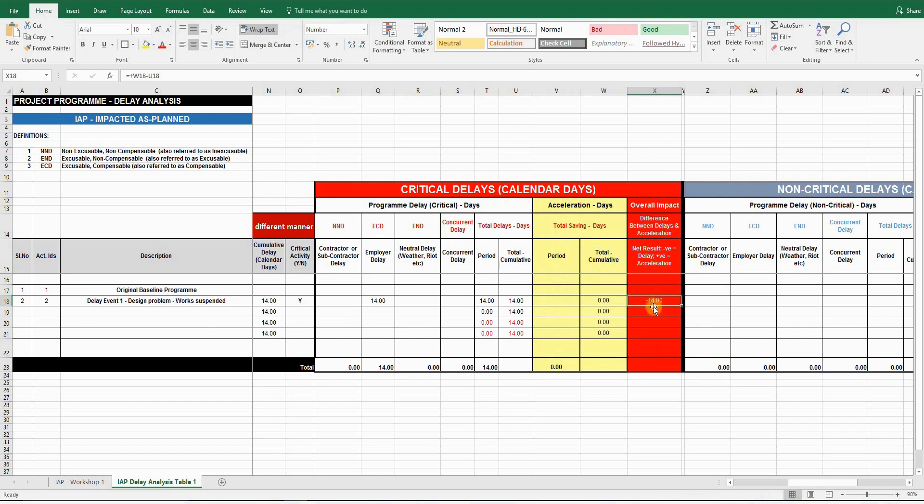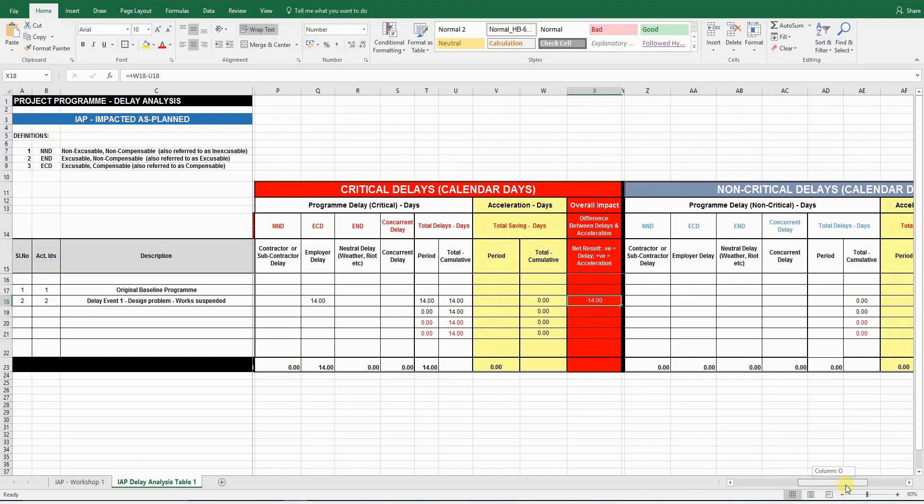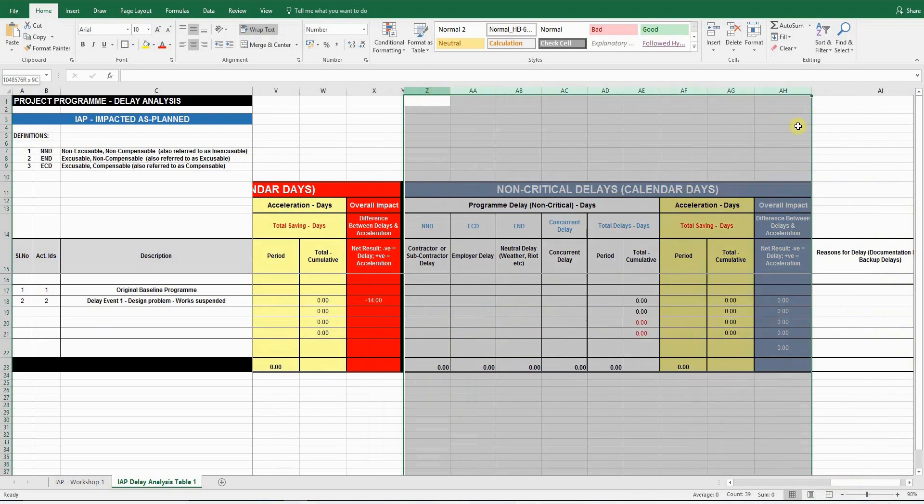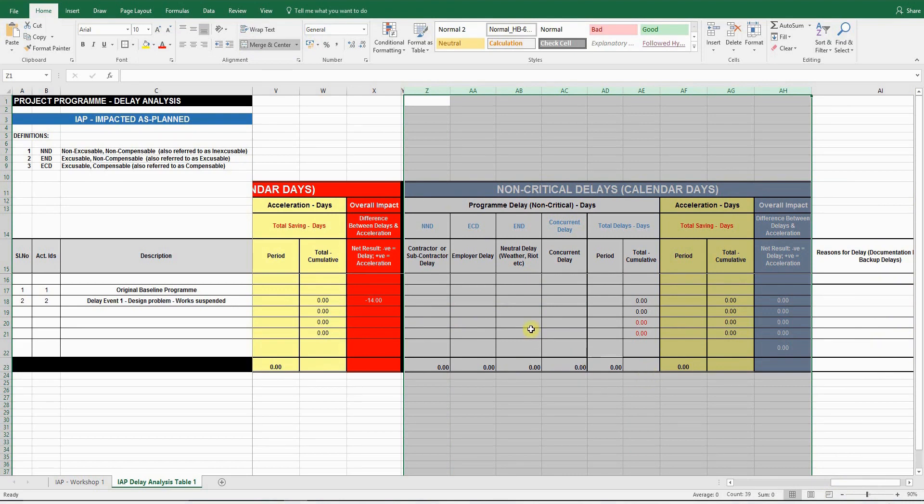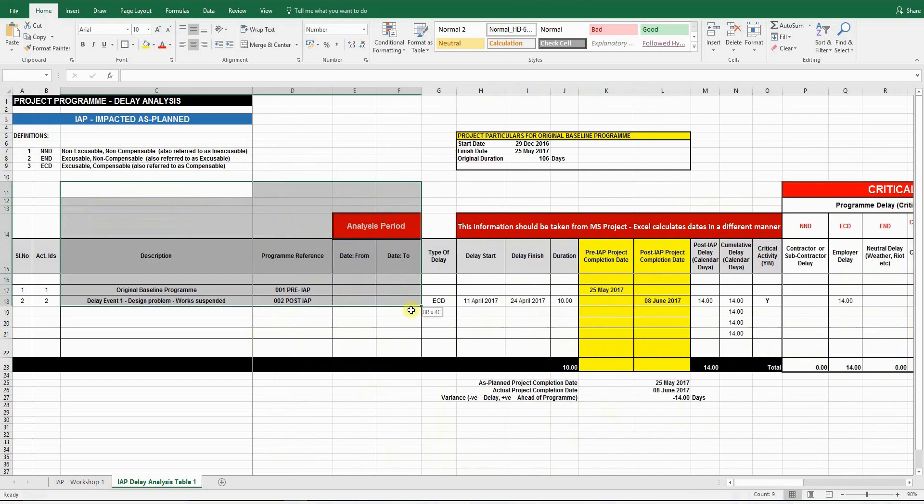This section here is for non-critical delays. So if the delay was not critical, it did not affect the critical path, but it maybe caused disruption, you could enter the data here. And obviously there won't be an extension of time claim, but you could possibly have a claim for disruption. So that's the delay analysis table.